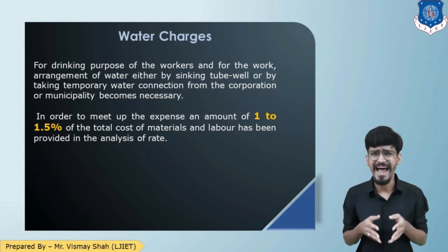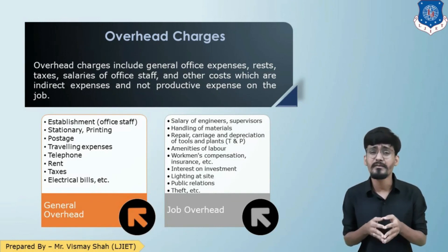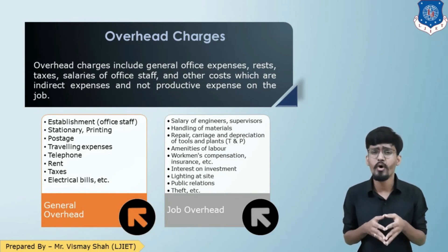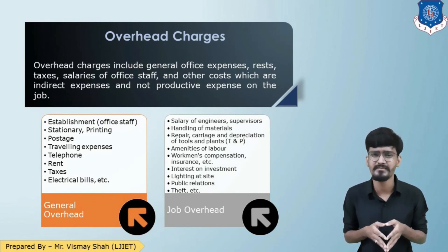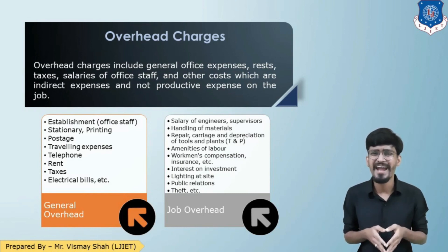The last terminology is overhead charges. Overhead charges include general office charges such as stationery, administrative costs, rent, and salaries which are not contributing directly to the construction — these are indirect costs and do not have any productive expense on the job. Overhead charges can be further divided into job overhead and general overhead. Job overhead consists of salaries of employees, handling of materials, repair, carriage and depreciation for tools and plants, amenities for laborers, workmen's insurance, interest on investment, lighting at site, public relations, etc. General overhead includes establishment of office, stationery, printing, postage, taxes, rent, traveling expenses, etc.